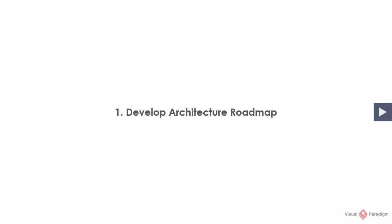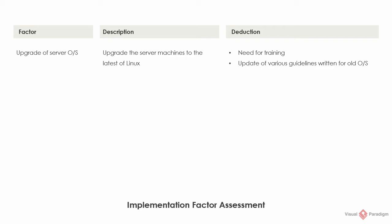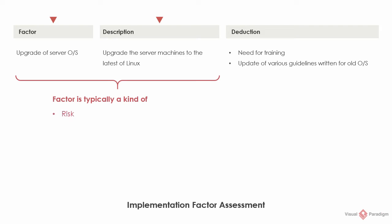Activity 1: Develop architecture roadmap. You've identified the baseline and target architecture and determined the gap in between. Here you are going to determine and confirm what changes would be involved during the transformation from baseline to target by creating an implementation factor assessment and deduction matrix. A factor is a situation that may potentially impact the implementation of the architecture — typically a kind of risk, for example a reduction of profit due to the temporary suspension of service. An issue, for example an outdated system. An assumption, for example that staff will have the required knowledge to use the new system without further training. A dependency, for example that backup must be done before kickoff such as the consolidation of IT services.